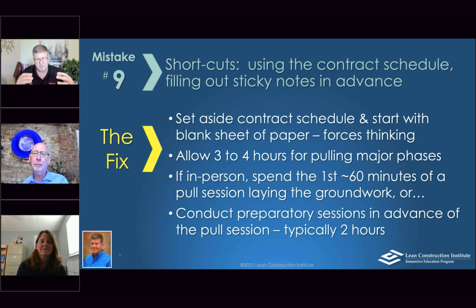Let's just talk about what are the elements that we've got to put together to get to that dry in, right? The curtain wall, the glazing, the storefront, the doors, the windows, the roof, the gutters, caulking, whatever it may be, and just focus on that, not trying to fit into a schedule. So often we try to do that, or we get caught up in it: oh no, it says I'm going to start roofing August 15th. Well, you may be starting July 15th if we do better on our work. So don't get wrapped around the axle with the contract schedule, at least out of the gate.